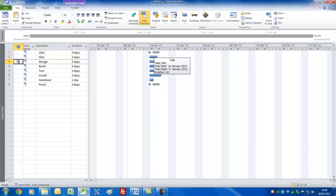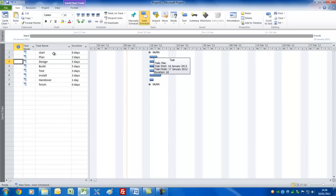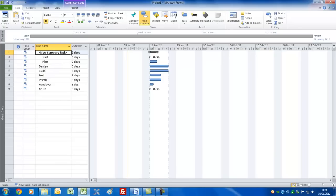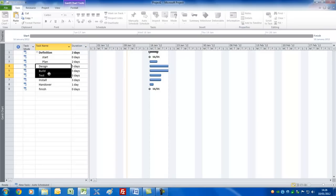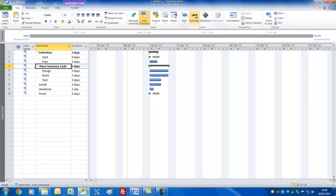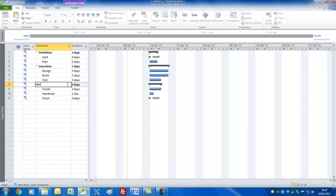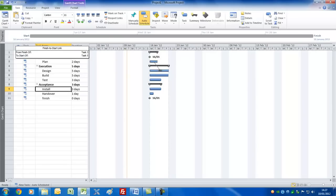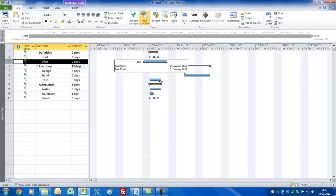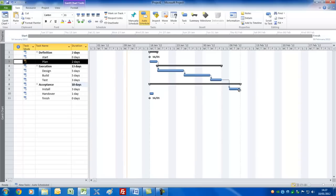For normal type projects, you'd want to have summary bars to show the different stages or phases. The way you do that is to select the tasks you want underneath such a summary task and click the Summary button. You'll see it's inserted a new summary task — we'll call this the 'Definition Phase'. Then select Design, Build and Test — we'll call that the 'Execution Phase'. Do the final one and we'll call this the 'Acceptance Phase'. And there we've done it.